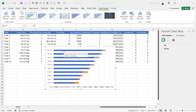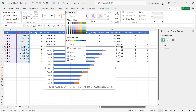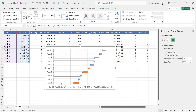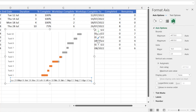We have something like the chart we eventually want. These blue bars we don't actually want to display, so click on one of the blue bars to select all of them. Go to the Format tab on the ribbon, go to Shape Fill, and choose No Fill — that effectively hides that series. We now have a large gap in front of the visible bars, so we need to change the minimum date value on the horizontal axis. Double-click the horizontal axis to bring up the Format Axis pane, make sure you're on the Axis Options button.